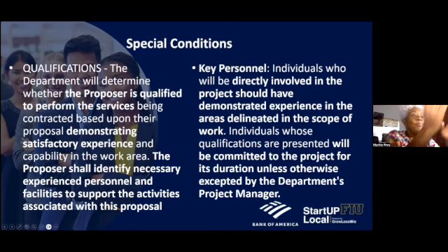The project manager on the government side is someone you have on speed dial, you have their email. For any changes that you suspect may happen, have open communications with them, because they don't want surprises as much as you don't want to get caught with, oh my God, I didn't know I had to do this. Let them know, and then they'll figure things out. But your key personnel, they expect that person to be there for the duration of that contract, if it's a 2-year or 3-year contract.